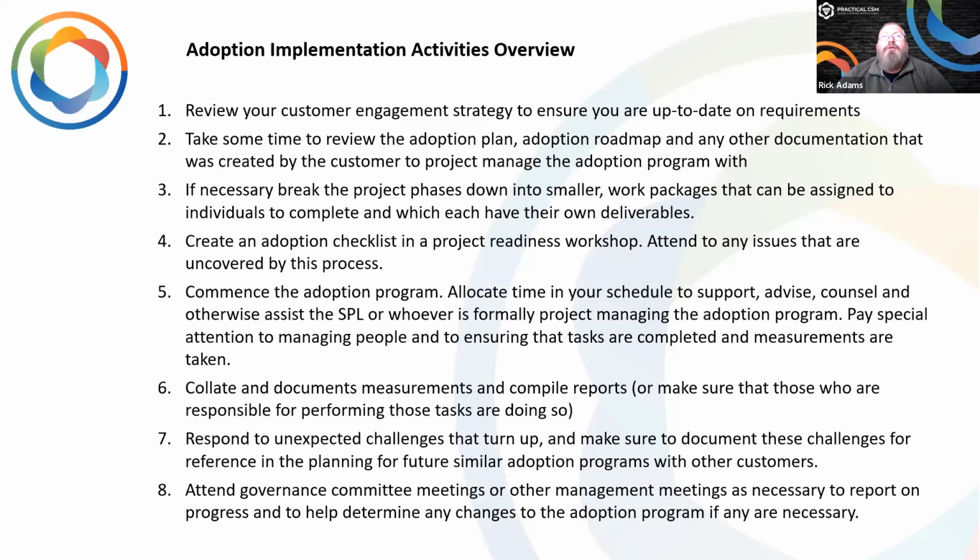But what we want to do is make sure that as the client goes through this adoption process, that we're up to date, that we've reviewed the adoption plan and the roadmap. We know what needs to be done, and they know what needs to be done. We're going to break it down into small bite-size packages of work that we can assign to get done. And then we're going to manage those little bite-sized chunks through the process of getting them done. And that's an important basic principle of project management.